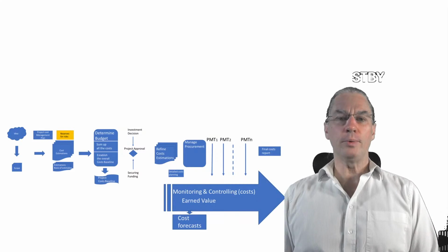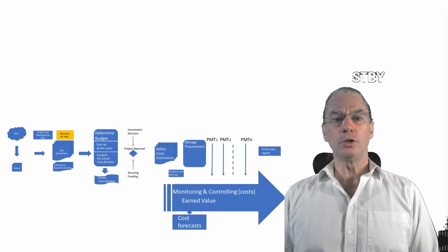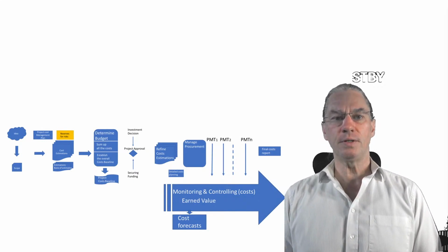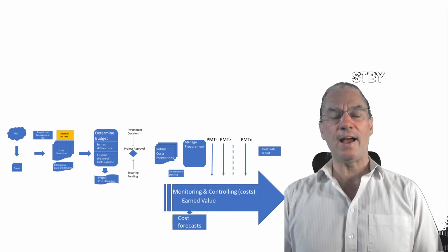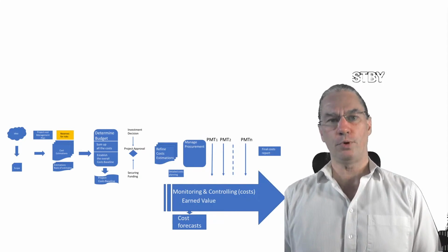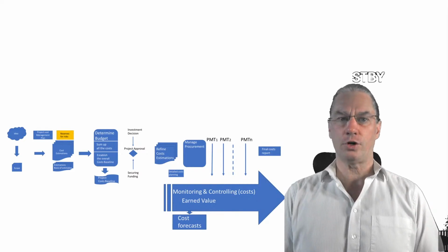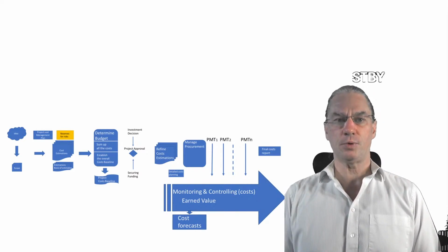So, with this, I represented the payments. You need to show in some way when you will need liquidities, when you will need cash flow in the project. Of course, this is if you are in charge of the costs in this project.